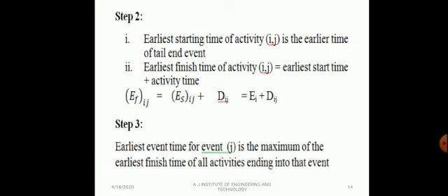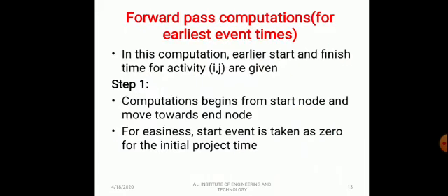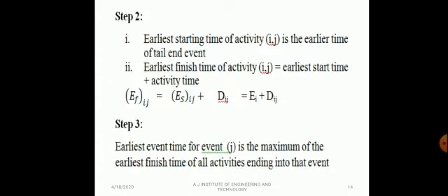Step 2: the earliest starting time of activity IJ is the earliest time of the tail end event.